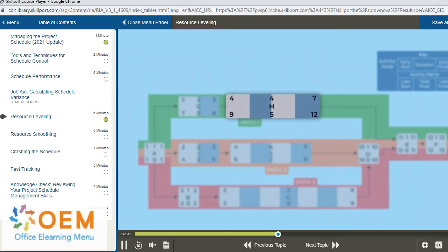If you said that activity H will double in duration because half of the resources have been lost, you are correct. Parametric estimating allows us to estimate and adjust durations based on the number of assigned resources. Now, activity H will take 4 months instead of 2, but there is no harm done. In fact, there are still 3 months of free float available on this activity.